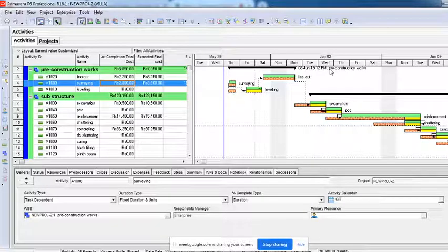Now, if issues are there, how do you deal with that issue, and when do you want to close it? Is that also a plan which we have to create simultaneously? All these issues have to be registered, very importantly, because these issues, or the response plans to the issues, become lessons registered. That means it's documentation called lessons registered. It's learning for this type of project or type of work that we have done.